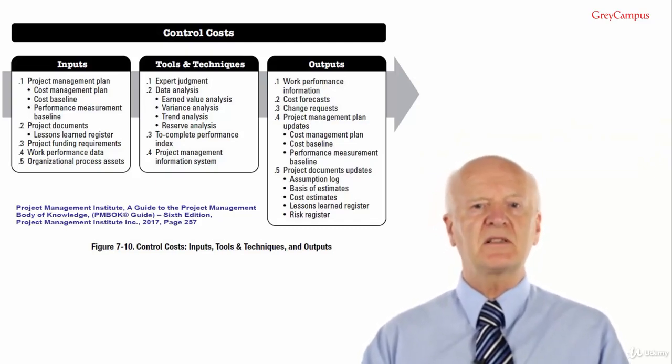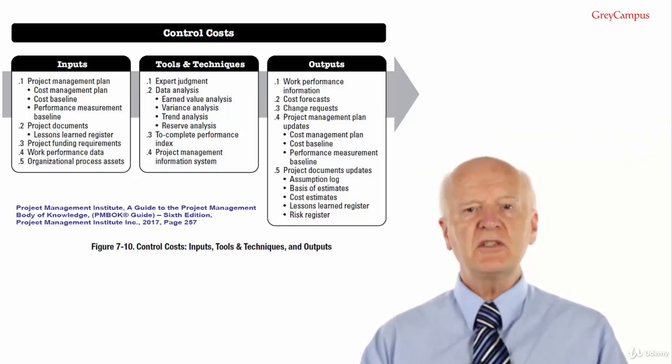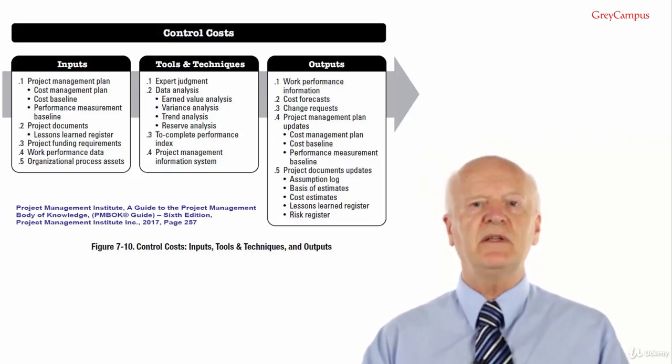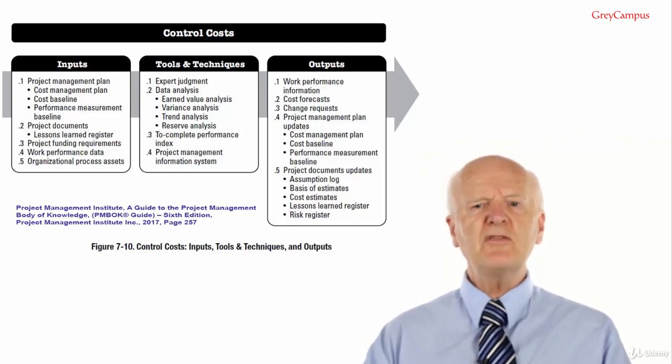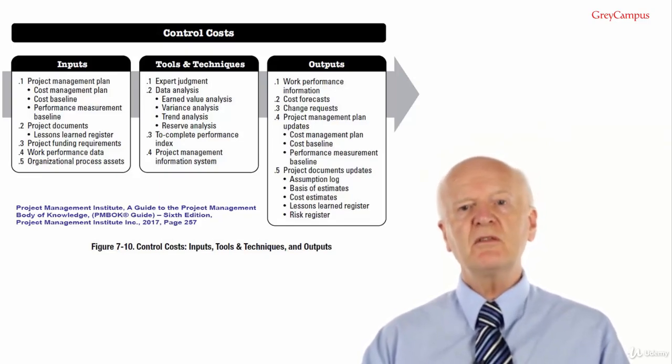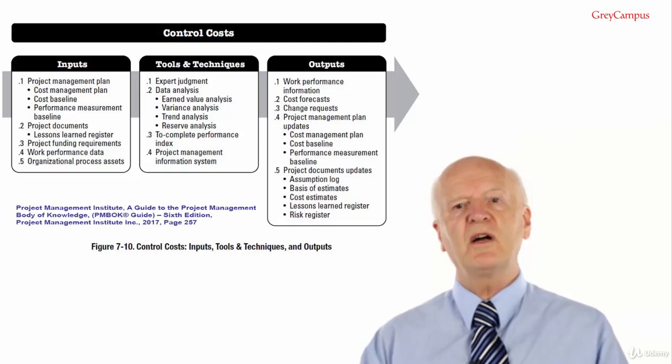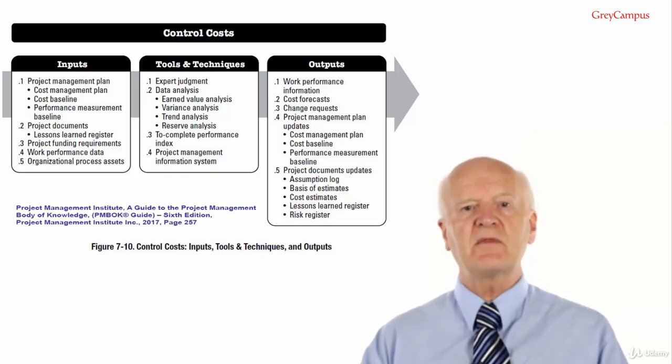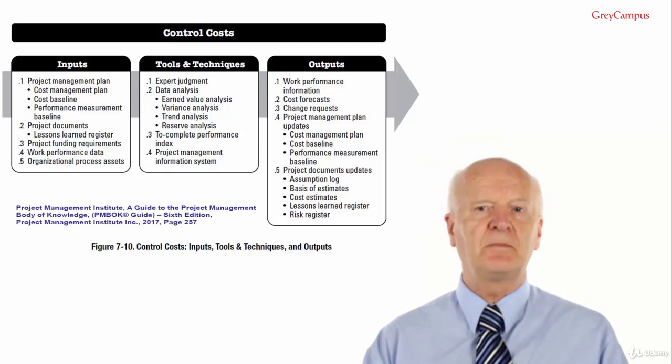What does this result actually mean? It means that for each dollar you budgeted to spend, you completed just 83 cents of work. And please remember for the exam, the precision required for answers is 2 places of decimals. Since the Schedule Performance Index measures all project work, the performance on the critical path also needs to be analysed to determine whether the project will finish ahead or behind its planned finish date.